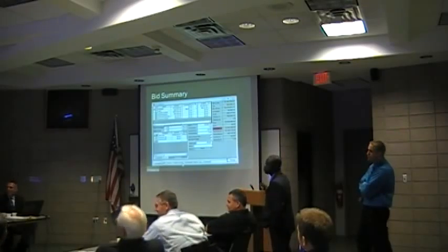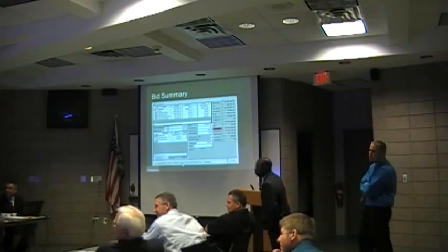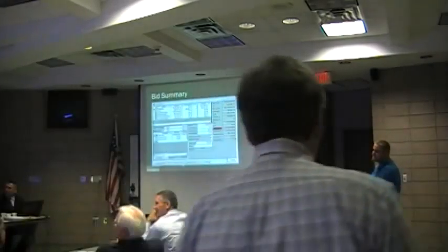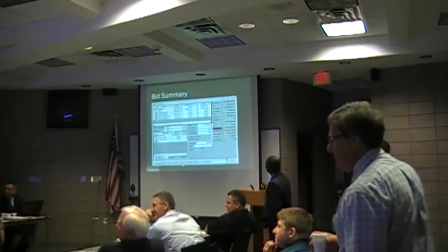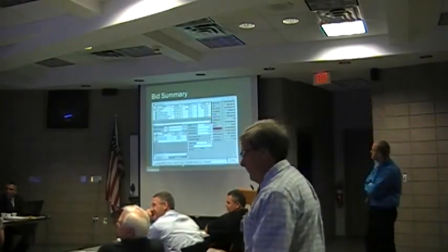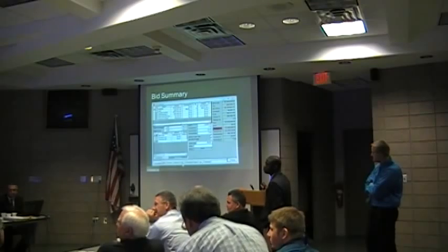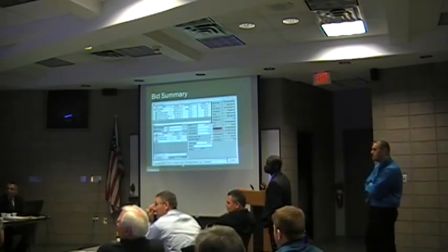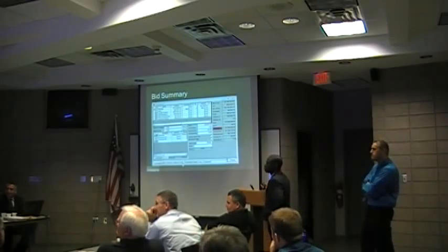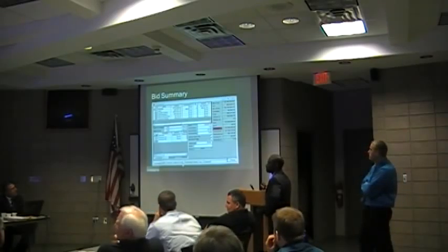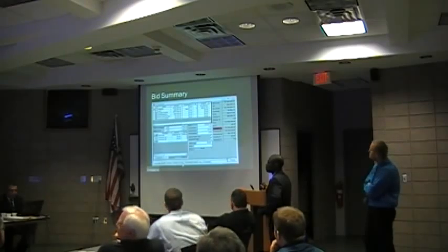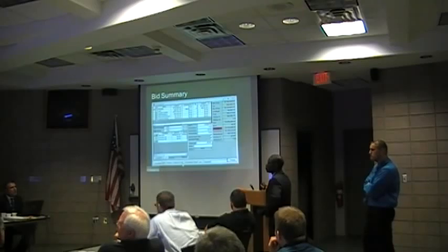We use McCormick, and that total return is misleading, because for example, direct job expenses, that 3750, is made up of a plug number, and if you don't mark it up, it drives that percentage down. And the other thing, you need to make sure that you click on your tax tab, and that you added tax to all of your taxable materials and so forth. Thanks.